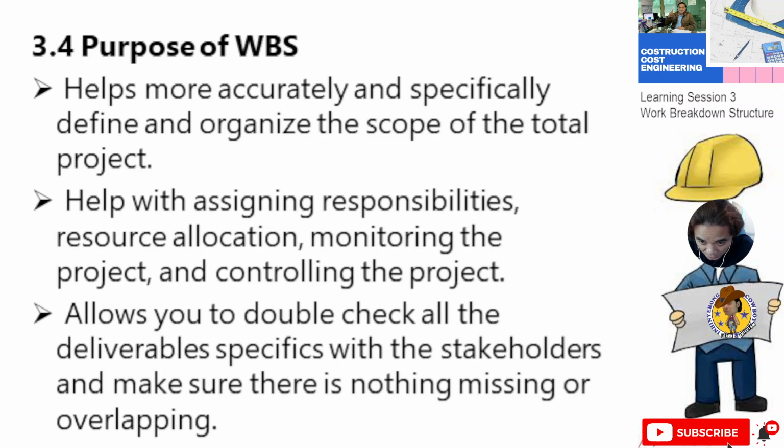Then number three, it allows you to double check all the deliverables specifics with the stakeholders and make sure there is nothing missing or overlapping. Okay, so imagine if you have a certain material that is not properly purchased and you have an overlapping purchase, meaning it added cost.